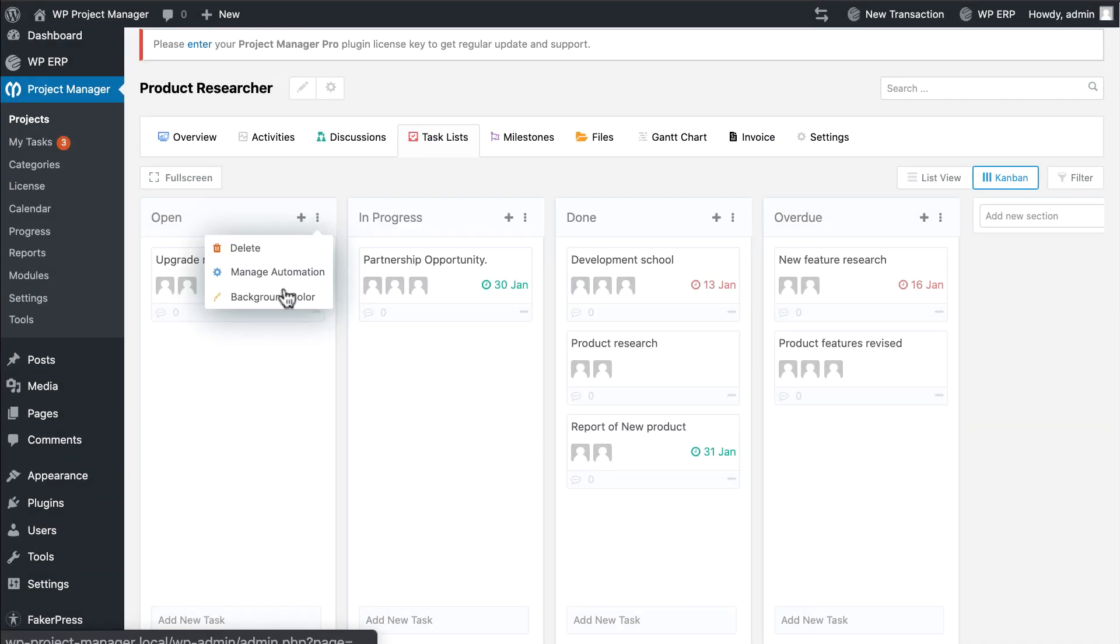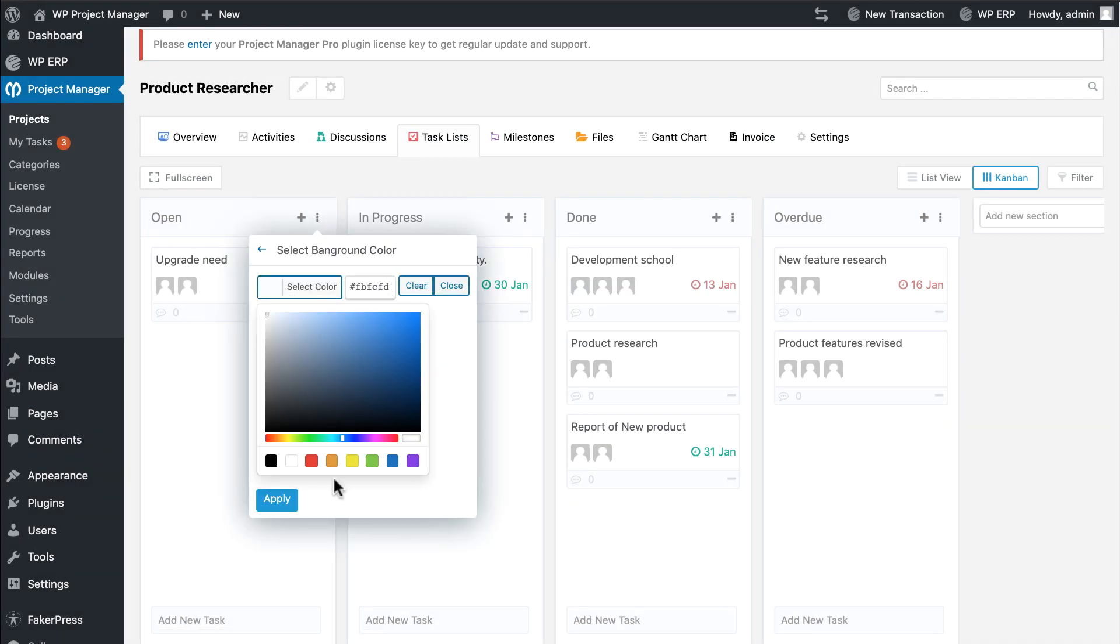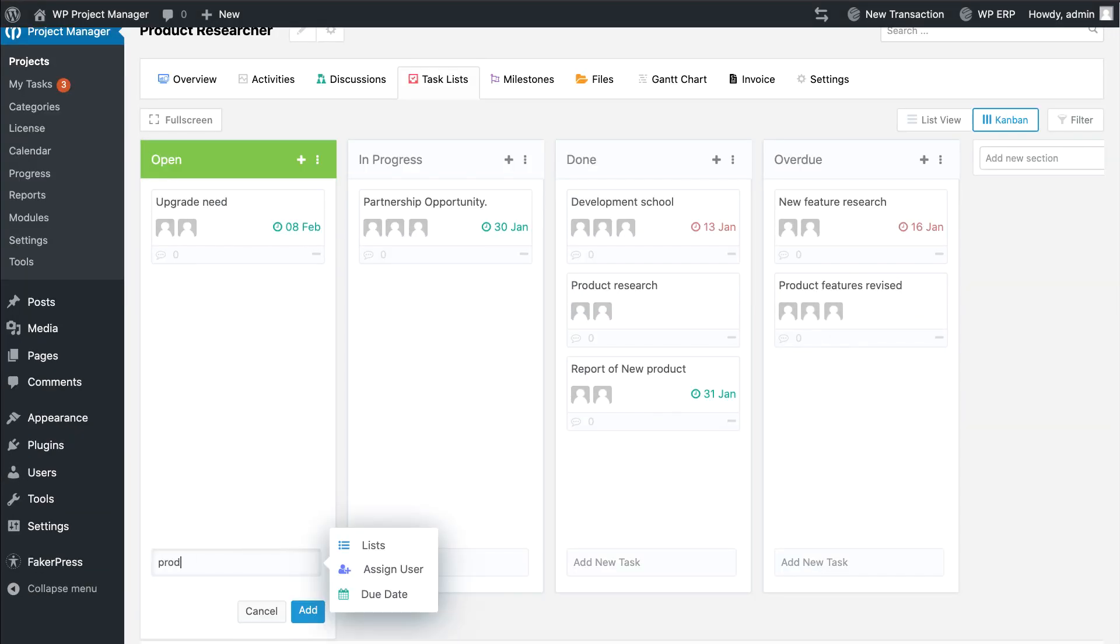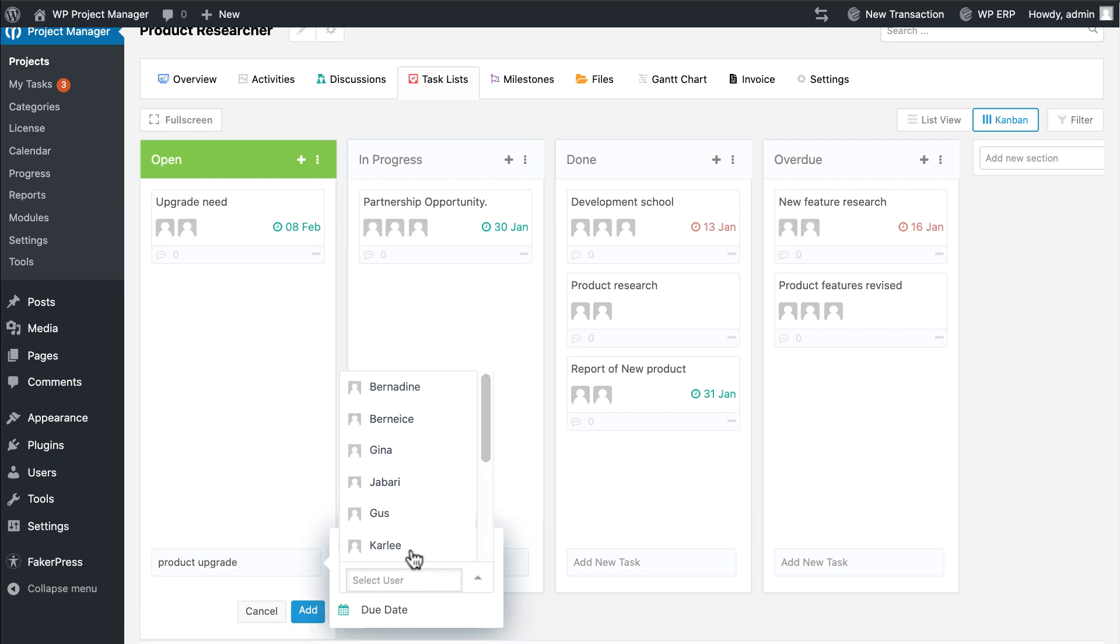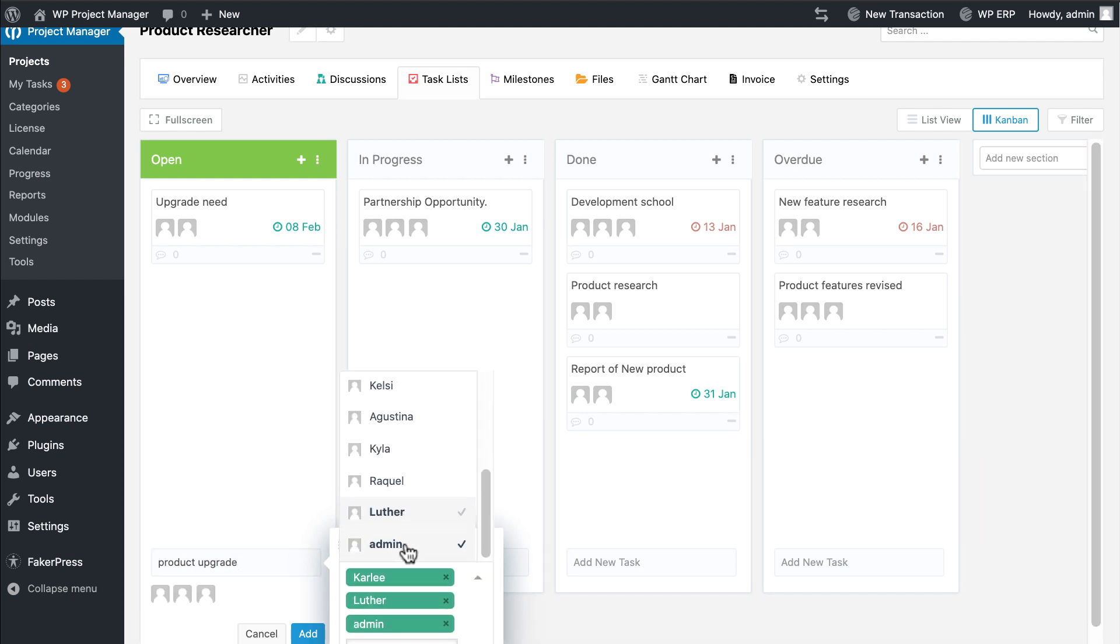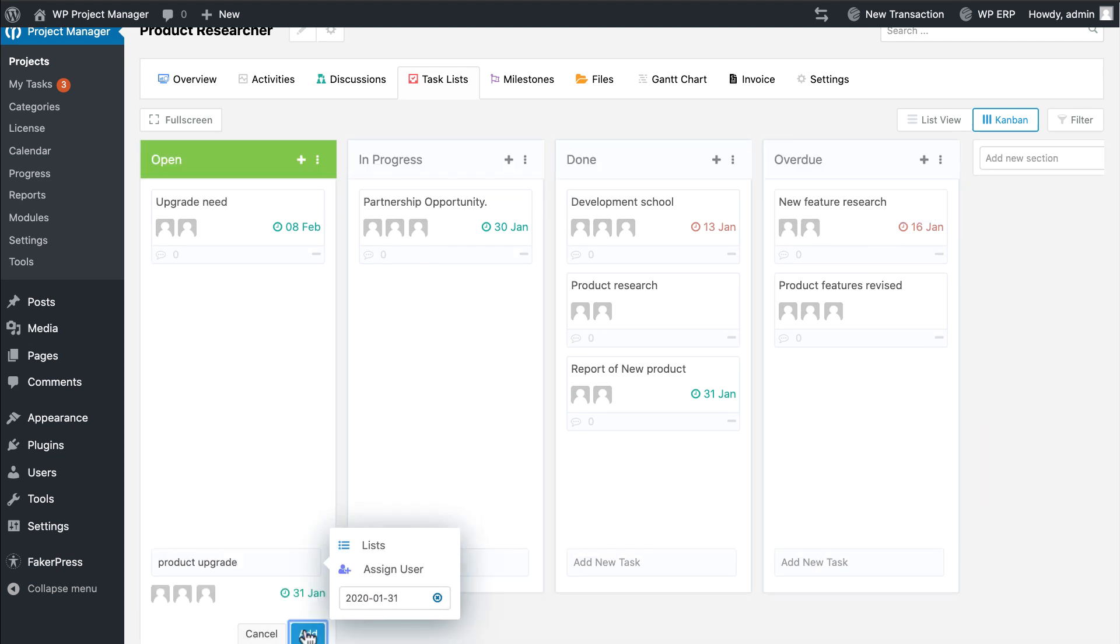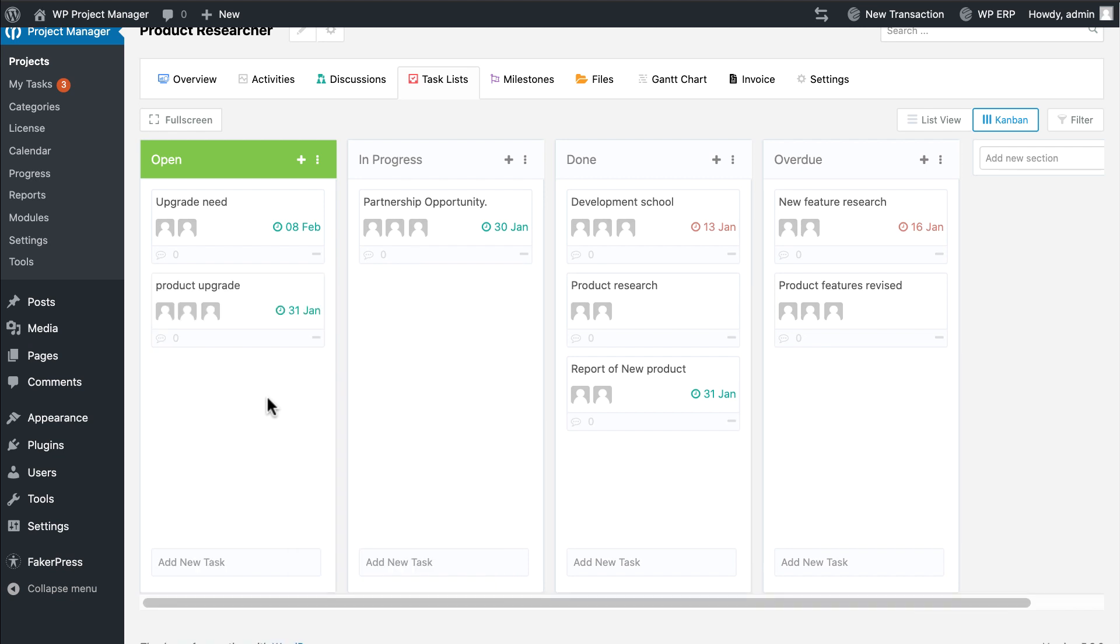Provide color for your board from the background color option. You can directly add your task from your board. Assign your coworker and set your task duration. Hit Add and your task is available on board.